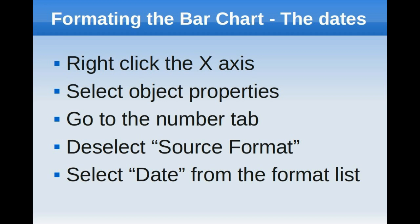Now, to change the numeric values at the bottom to dates, you want to right-click on the x-axis, select object properties, then go to the number tab, deselect the source format checkbox, and select date from the format list over on the left.